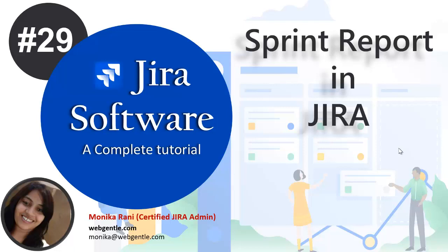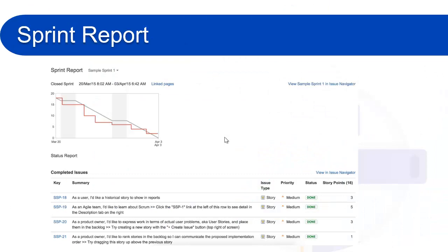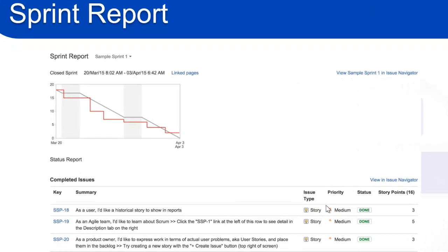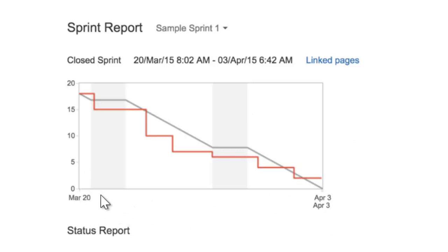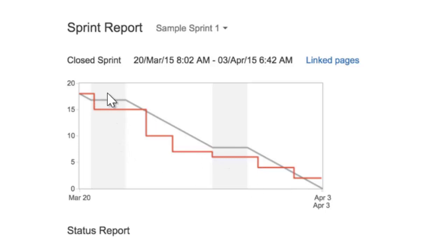We'll go to the next slide and see how it looks. This is a sample Sprint Report. In the bottom part we have the title 'Completed Issues' where you can see the key of the issue, summary, issue type, priority, status, and story points. As I told you, it also includes a condensed burndown chart. Here you can see we have a burndown chart. In the horizontal axis we have time, and in the vertical axis we have the estimation statistic. If you don't know how to read the burndown chart, I would recommend you watch my previous video where I explained how to read it. Here you can see we have this red line, this gray line, and these gray boxes.